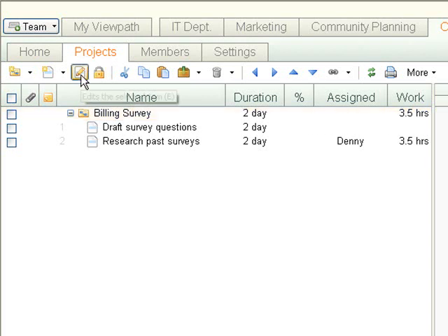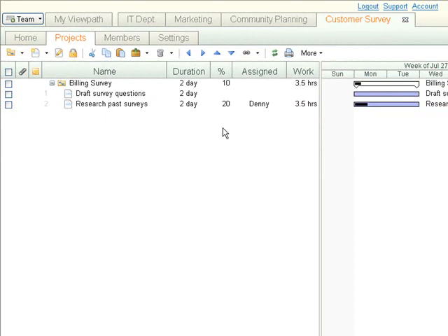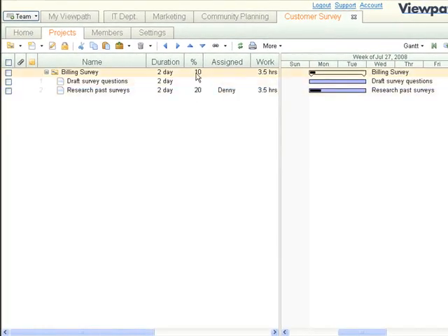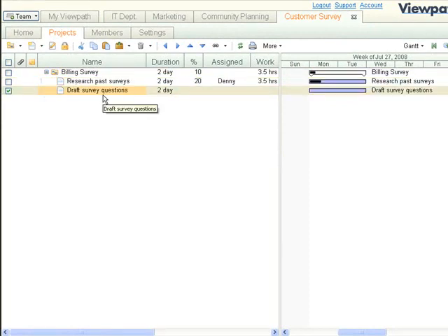To update the percent complete, I can click on the edit icon here, or simply double-click here. I'll enter the number 20 and click the white space here to close the in-cell editing. You'll now notice the percent complete automatically rolls up in the activity hierarchy both in the column here and as a graphical percentage in black here. To move activities on the list, I select the checkbox here and click either of the blue up or down arrows here. Or I can simply drag the selected item to the appropriate place in the list like this.